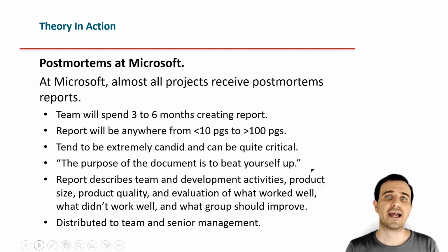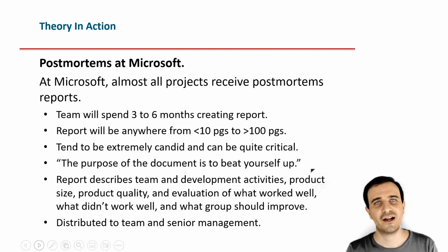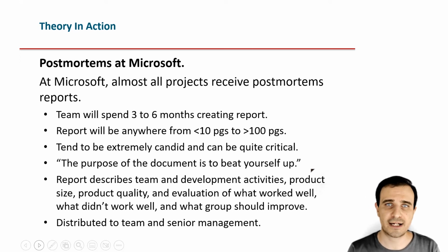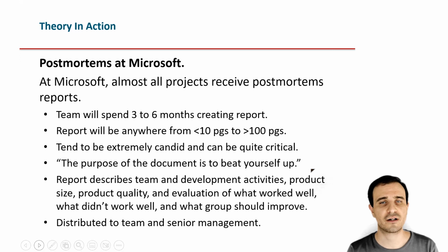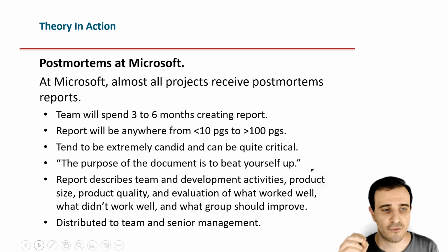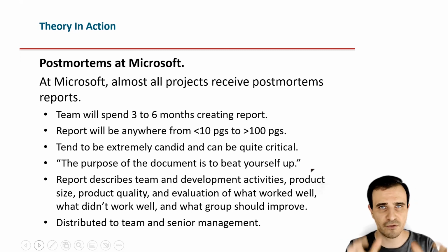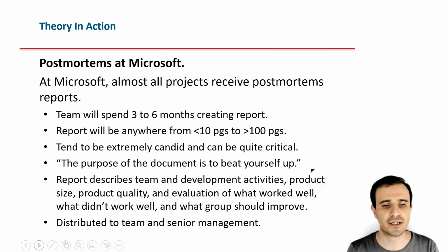One important experience to recall is the postmortem reporting at Microsoft. This is a very good practice that many more firms or even startup ventures should adopt. At Microsoft, almost every project will receive this post-mortem report. It doesn't matter whether the project was successful or not successful. This is like an ending report.